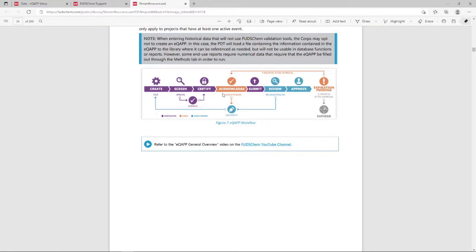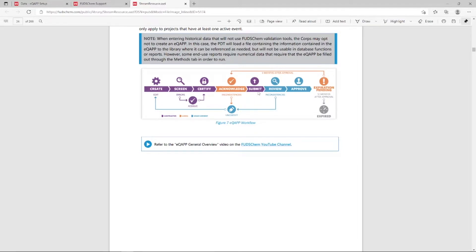If the lab has any concerns — for example, if the EQAP lists a method the lab no longer runs — they will let the contractor know. The core chemist will uncertify the EQAP to allow the contractor to make updates if necessary. If the lab agrees to report data in accordance with the EQAP, they will click Acknowledge. Note that multiple labs can acknowledge an EQAP if needed. Once all applicable labs have acknowledged the EQAP, the contractor will submit for approval. The core chemist will review the EQAP and, if updates are needed, uncertify so the contractor can update. If no updates are needed, the core chemist will approve the EQAP.